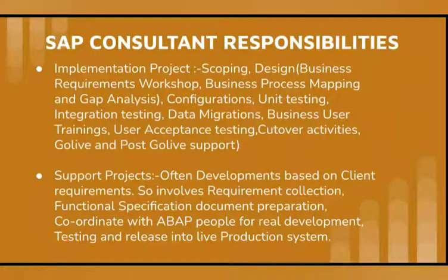So the difference between unit testing and integration testing is based upon the role authorization testing. In unit testing we will not cover role authorization, and in integration we will cover it, and also test along with all the modules, whatever the integration scenarios, everything will be covered in integration testing.